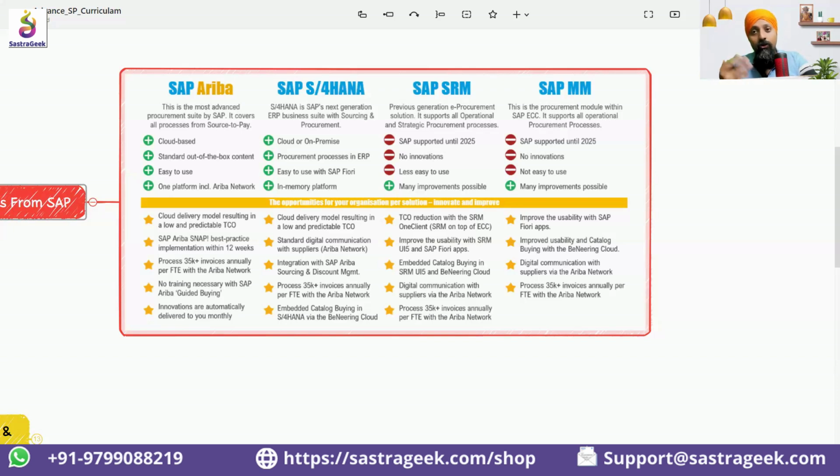Now that is not something you buy on a daily basis, right? For that, you need to find a source, that is, from whom should I buy? Whether my existing vendors or the list of vendors who deal in that category, do they have that material? If they have, how much do they quote? Then I need to take quotations from the different vendors, compare them, finalize who should be my vendor, onboard that vendor, and then start the procurement process for it.